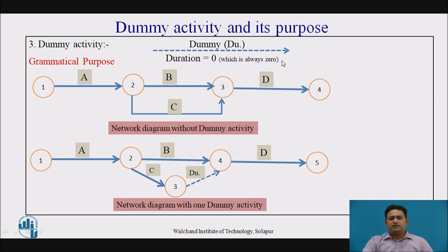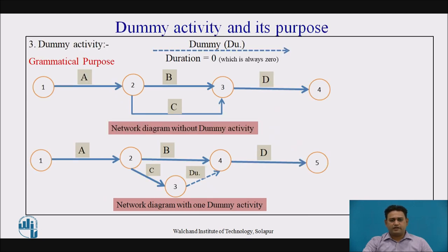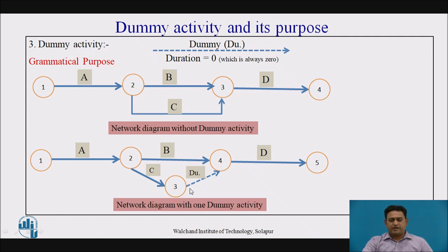Now, dummy activity and its purpose. A dummy activity is an activity which does not consume any time or resource. They are only presented in the network diagram for logical maintenance. The grammatical purpose and logical purpose are the two main purposes for using dummy activities in a network diagram. The grammatical purpose means: if two activities have the same starting event, their ending events should be different. For this purpose, here B and C start simultaneously, and to maintain grammatical correctness we place the dummy activity as shown.